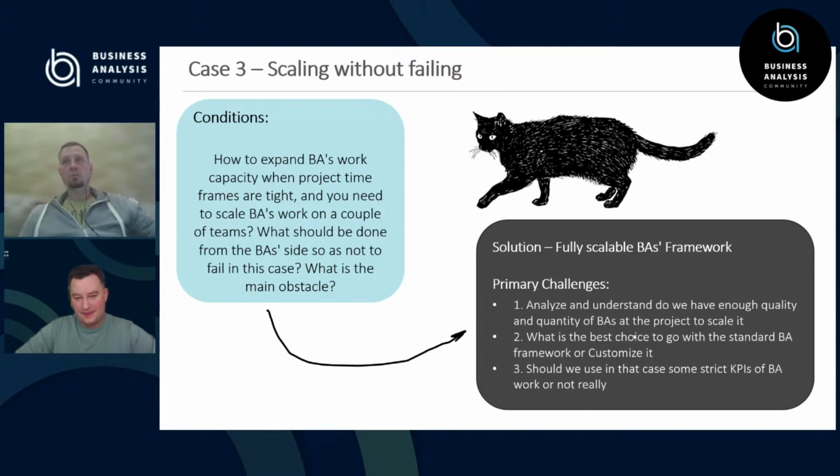Because from known understanding of this field, one business analyst could support up to 6 or 8 colleagues, providing them qualified requirements for maintaining the normal work of the team. But if this quantity is more than 6 or 8 people, the quality of our requirements could be not enough for comfortable work of our teammates. The quality of our product also will decrease, and before the scaling, we should provide such kind of analysis.